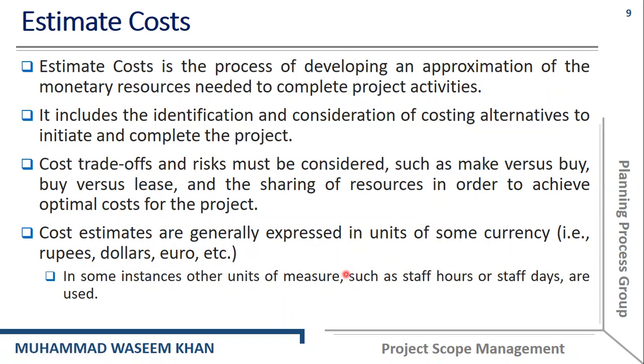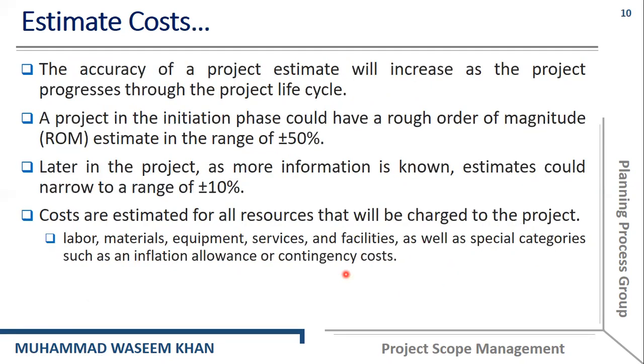The main theme of this particular slide is that, as we did in the previous lecture, we estimated the schedule, the starting and ending dates or timings for every activity, and at the end we identified the total duration of the project. Similarly, we have to identify the cost. We have to estimate the cost for each and every activity, and then at the end we will have the overall budget and cost that are needed for a particular project.